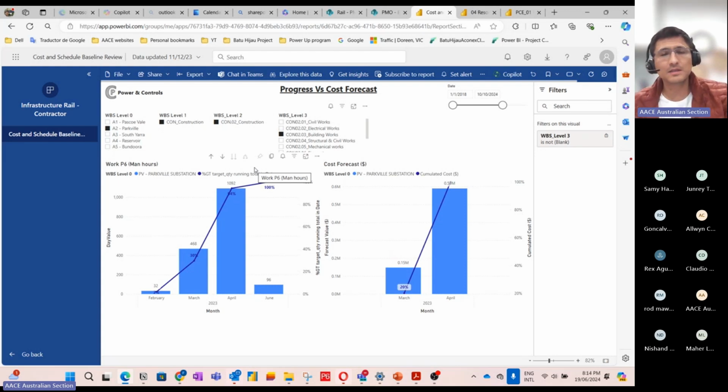If you go through the ASCE knowledge and cost management framework, you'll see that a WBS is a basic concept that should apply to cost and everything else in the project. So the WBS basically drives the control reports for any project.